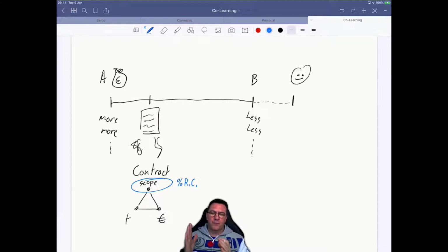If we look at the contract in the beginning, and then validate how much of the requirements of the scope in the contract had been changed, added, or removed versus the end, and then put a percentage, we get things like between 30 to even 300%. That's what I see happening in the courses.